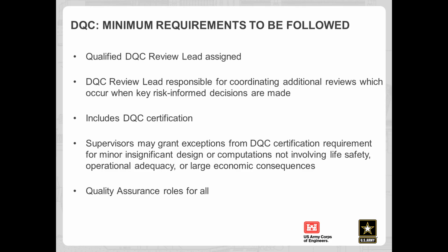There's another requirement for DQC certification, and there's an exception that's spelled out for when you don't have to do DQC. But basically anything that you do where someone's going to use your work to make a decision needs to be DQC'd. And then there's a description about quality assurance roles.